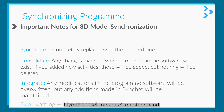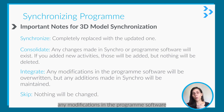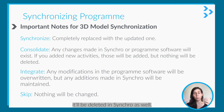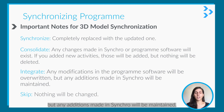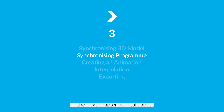If you choose Integrate, any modifications made in the program software will overwrite Synchro — so if you delete anything in the program, it will be deleted in Synchro as well — but any additions made in Synchro will be maintained. If you choose Keep, nothing will change. In the next chapter, we will talk about creating an animation in Synchro Pro.